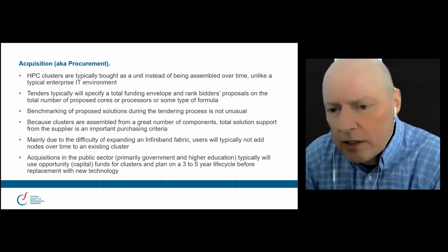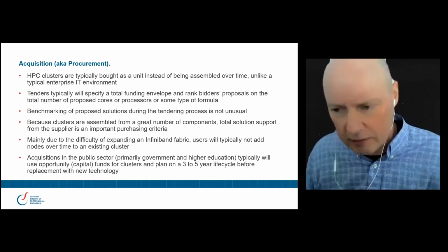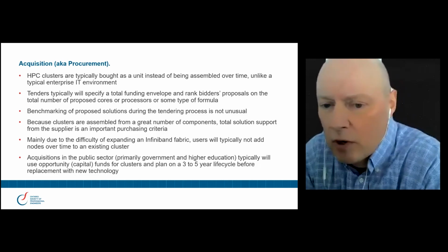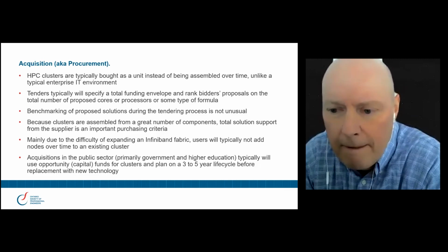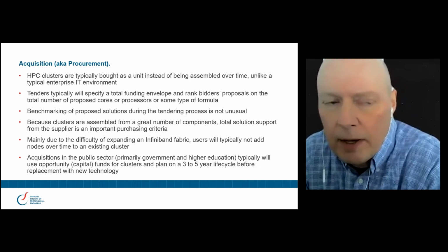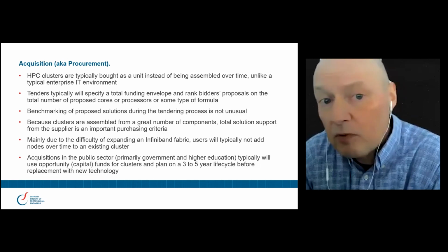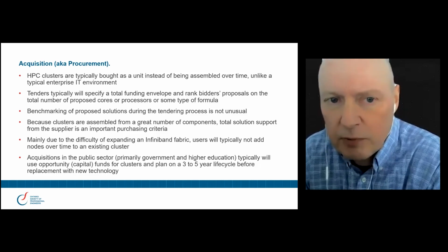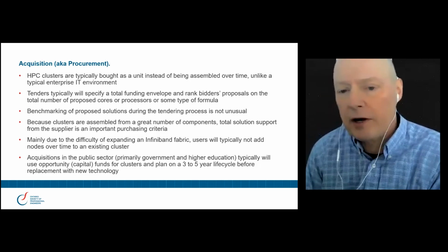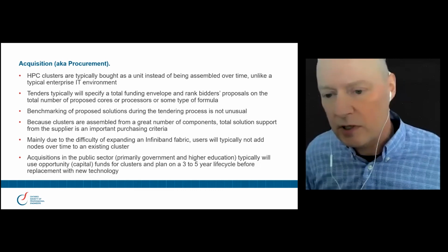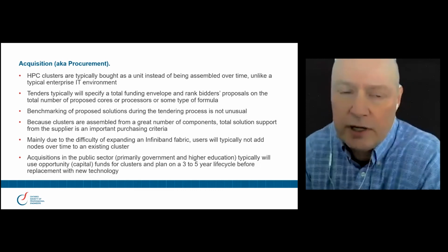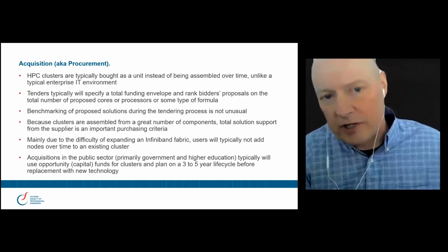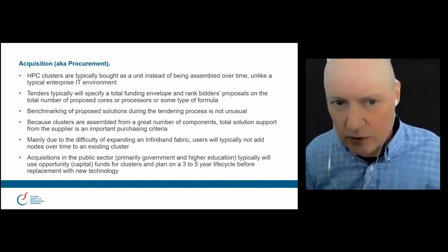Because clusters are assembled from a bunch of components into a single unit, customers will typically ask for total solution support from the supplier, because it's being assembled from components that come from multiple vendors. The purchaser typically wants to offload the risk of managing those multiple vendors and push that back onto the supplier. So it's not unusual in this business to have consolidated warranty service for the combination of equipment. I go back earlier to the customer's choice of purchasing white box machines or from a tier one.